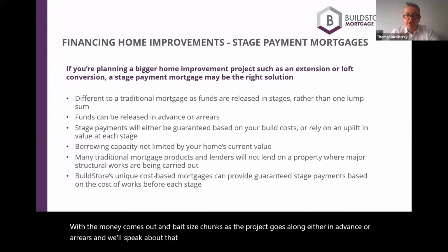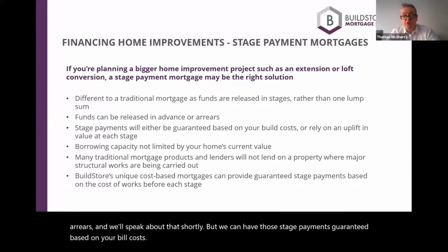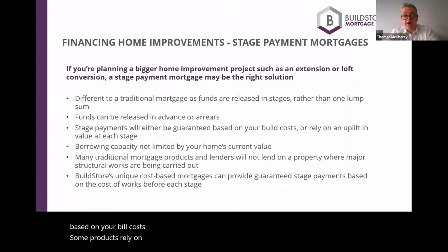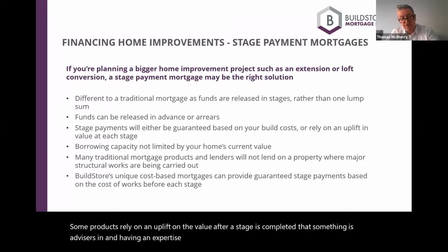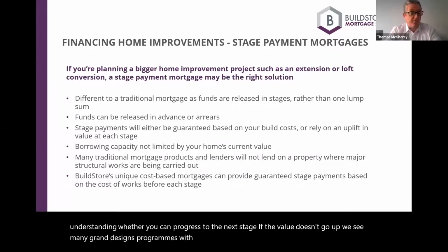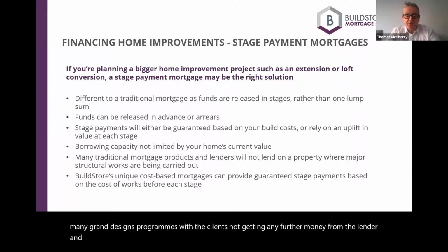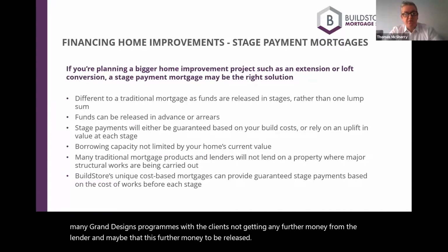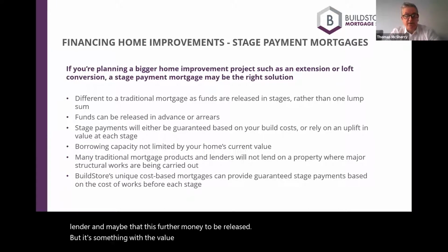But we can have those stage payments guaranteed based on your build costs. Some products rely on an uplift on the value after a stage is completed. That's something as advisors and having an expertise in this area, Build Store are very focused around understanding whether you can progress to the next stage if the value doesn't go up. We see many Grand Designs programmes where the client's not getting any further money from the lender. It may be that there's further money to be released, but it's simply that the value hasn't increased in line with the spend and the lender cannot release any further funds.